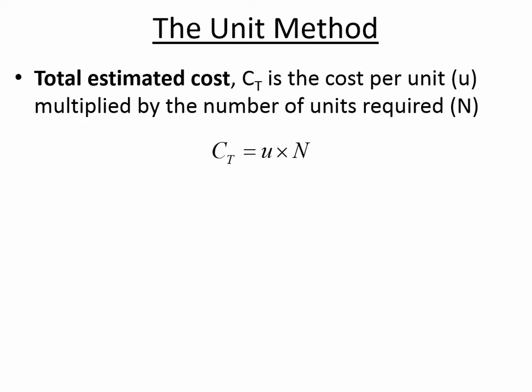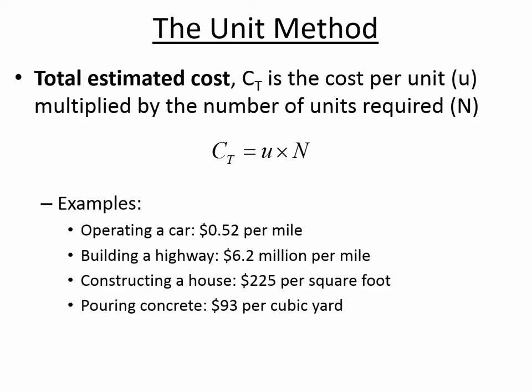And so you'd find out the cost of a bridge by saying the ingredients of a bridge are concrete, steel, labor, and land. And so you find the cost of each of those components and the amount of it you're using and multiply it together, then add the individual costs.